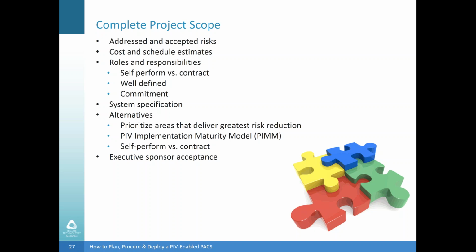You'll need to assess the capabilities within your organization, and decide which pieces of the project you'll self-perform and which ones you'll issue contracts for. The most important part of this step is commitment. No matter whether it's internal or external, the people and the organizations need to make firm commitments to providing the resources and meeting your project schedules.